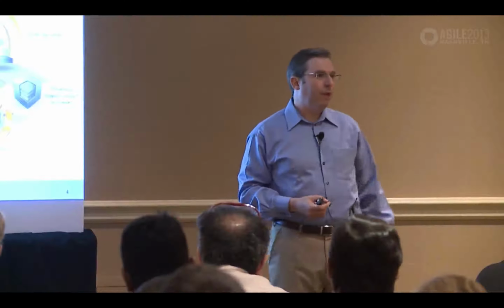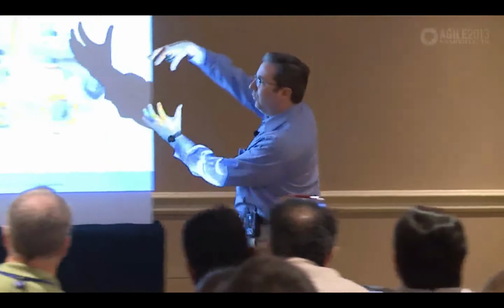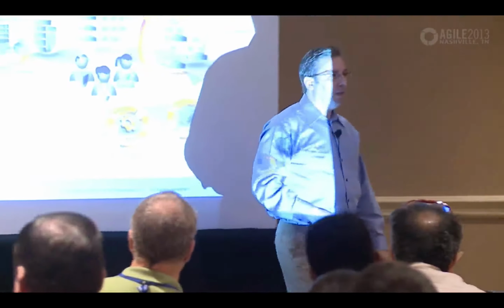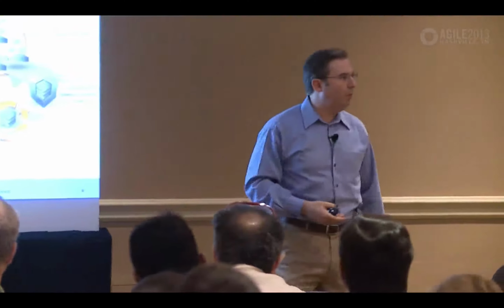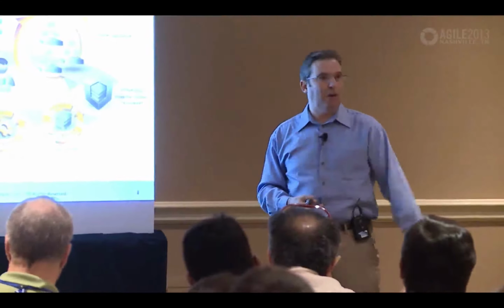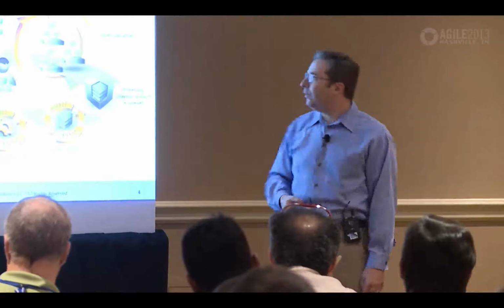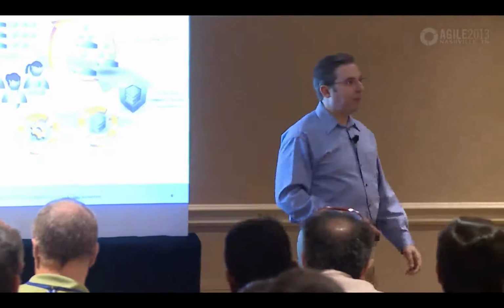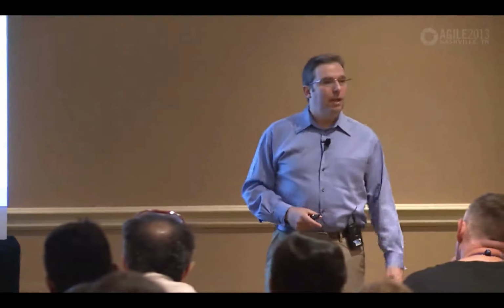The gray looping arrow that dominates the center of that picture is intended to be a sprint, and the first activity in any sprint is the planning activity, the goal of which is pretty simple: pull some number of ready features off the top of that product backlog into the current sprint based on available capacity. Those two orange arrows are trying to define a capacity, and we pull till we get to some reasonable WIP limit associated with that sprint, and then we stop. And that becomes the focus for that sprint. Most teams consider creating a sprint backlog, which takes those features and breaks them down into tasks with the goal of trying to acquire confidence. Are we confident we can get this done?